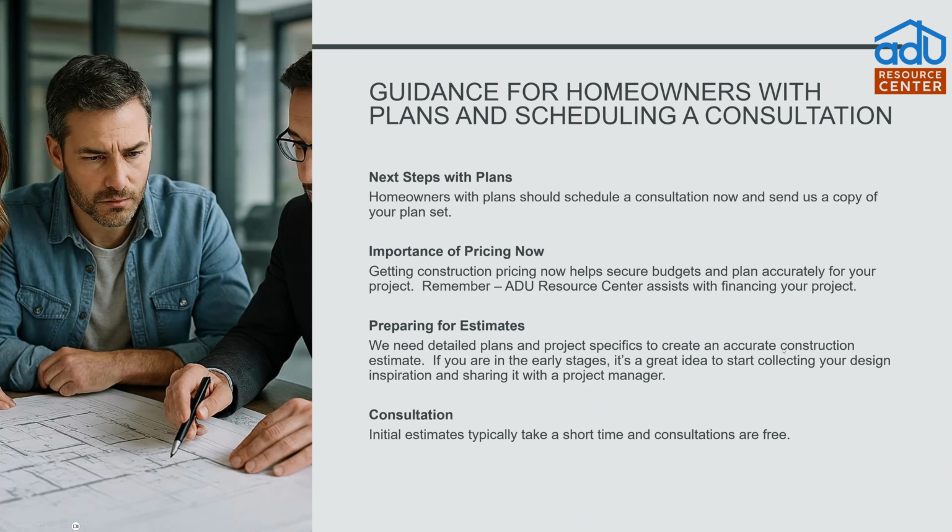Preparing estimates. When it comes to preparing estimates, I would say that if you're very early in this stage, you're not ready yet for a formal estimate. What you're ready for is an estimated range and what to expect from contractors. Just get a guideline of what you're going to expect in terms of a price range.